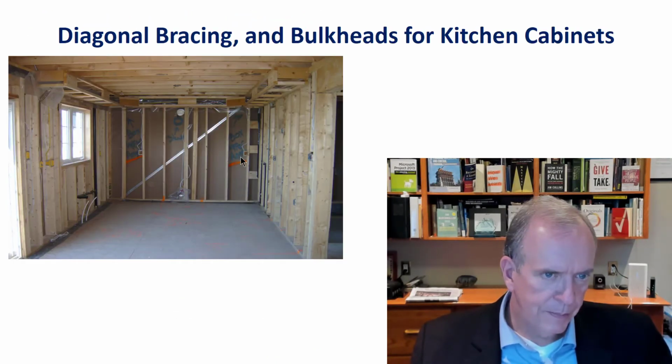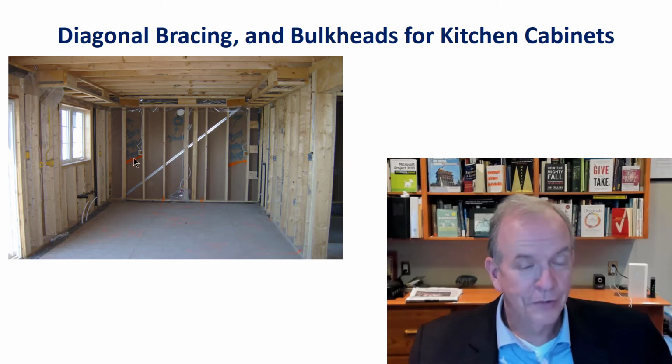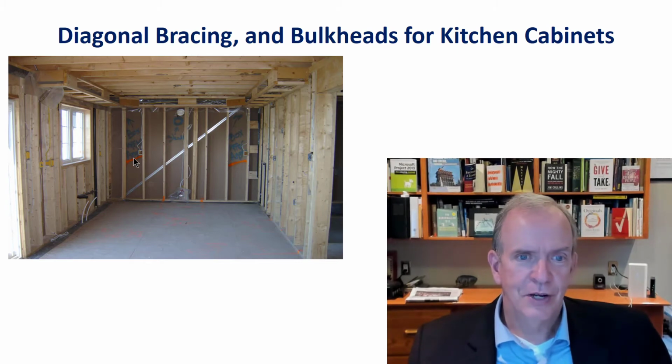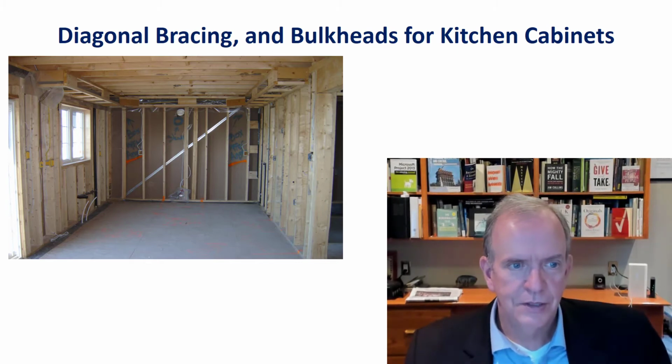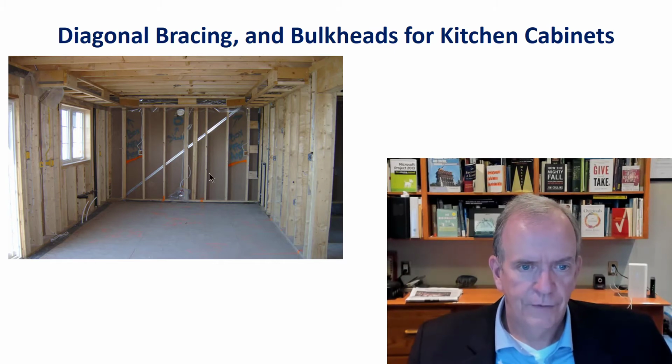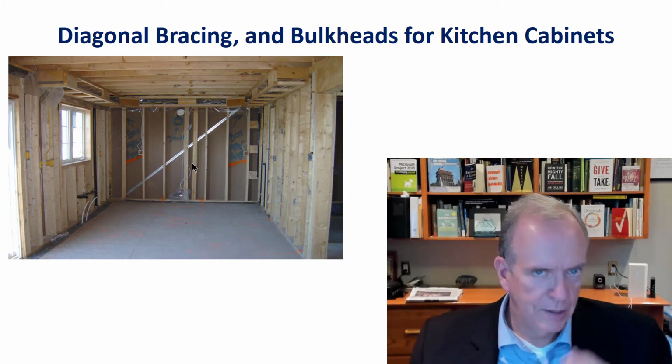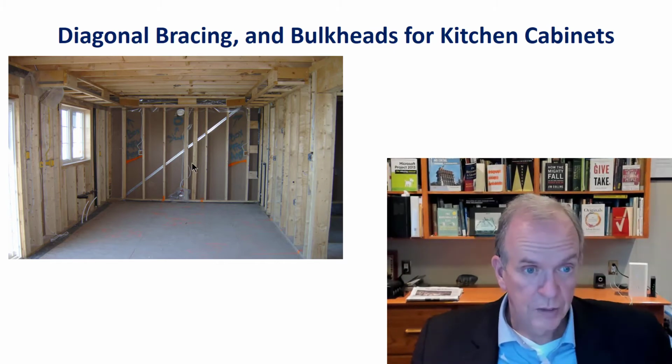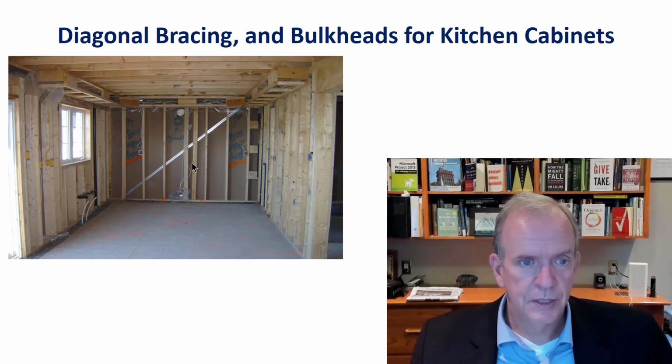You also notice the spray paint in here. This is the site super putting notes to the different trades on the wall. Not a bad idea. In case the trade goes in and starts doing something, they put notes to make sure you do this, make sure you do this, and mark things out so that they don't do something they shouldn't do. So just an effective way of communicating. It's all going to be hidden later anyway, so if it prevents somebody from doing something they shouldn't, then that's a good thing.